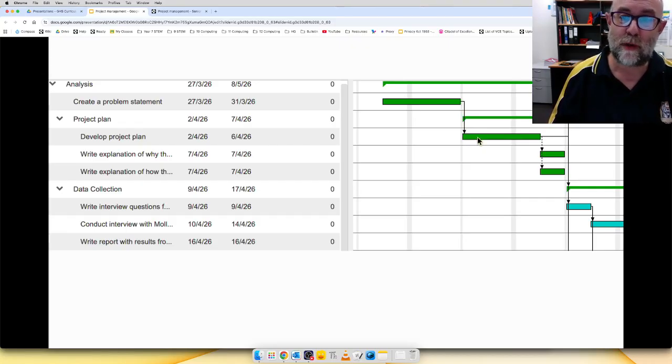Sometimes the software will produce a red arrow and people are just like, oh, I don't know why that's red. Well, why that's red is that you've actually said that you can't do this one until you finish that one, but this block is over here in the same time. So you're saying that they're dependent, but you're not treating them as if they're dependent. So if it genuinely is dependent, then you actually can't do it until it's done. This is what yours will look like, and demonstrating the dependencies is a key part of what your Gantt chart needs to do.